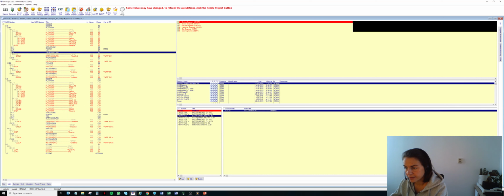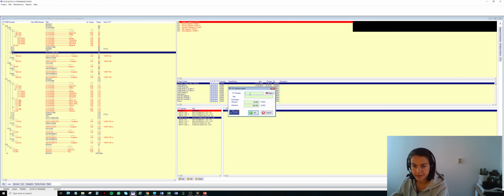So we can see here in my ITT box they have some tilde ITT number. This means that they are the budgetary subco. But now I want to have a proper ITT reflecting on this subsystem. So I can here add an ITT, which will be the ITT 4. Data handling.